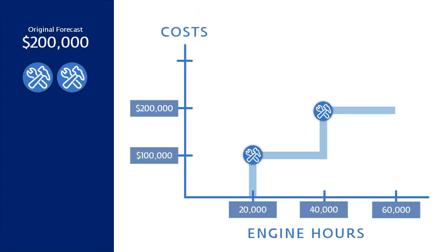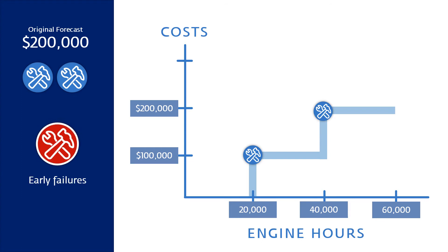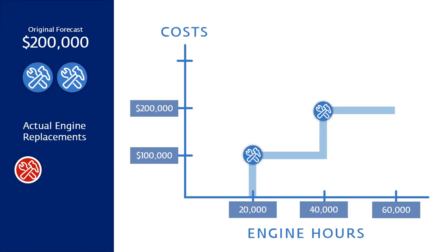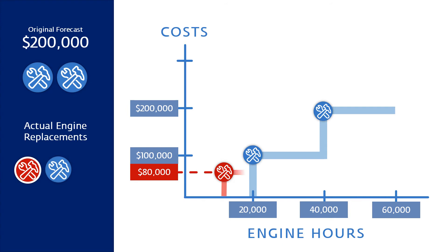But what happens when early failures are introduced? What if the first engine needed to be replaced at 15,000 hours, but only costs $80,000? If we only look at its current status, we could assume that everything is on track. In fact, we would be tracking under budget.